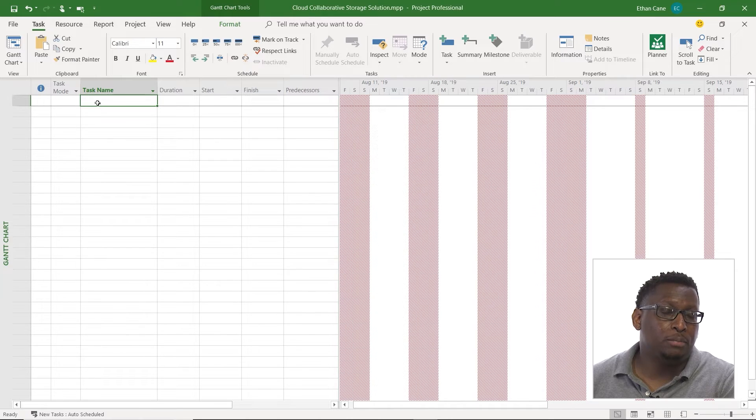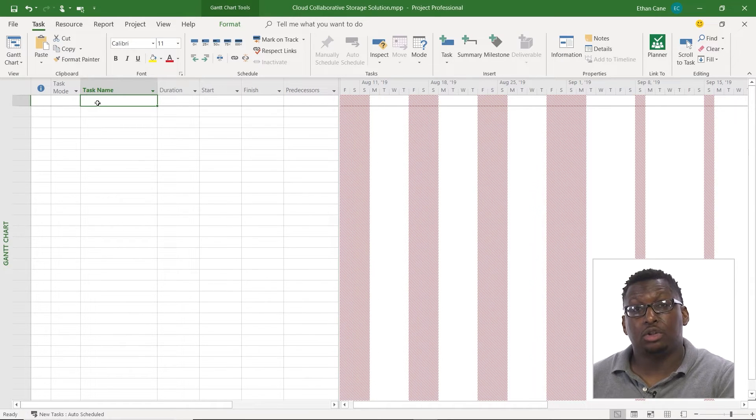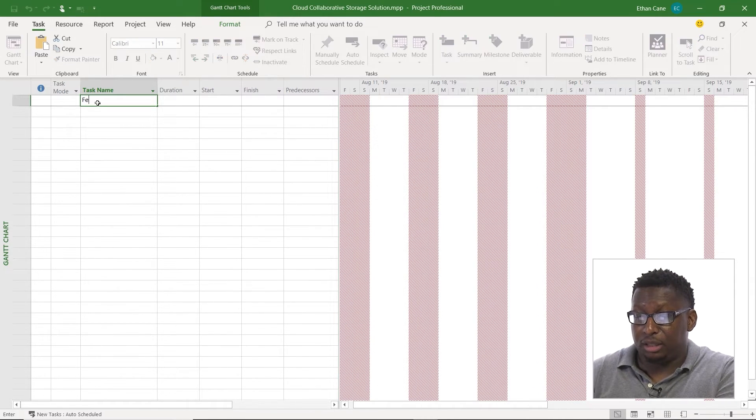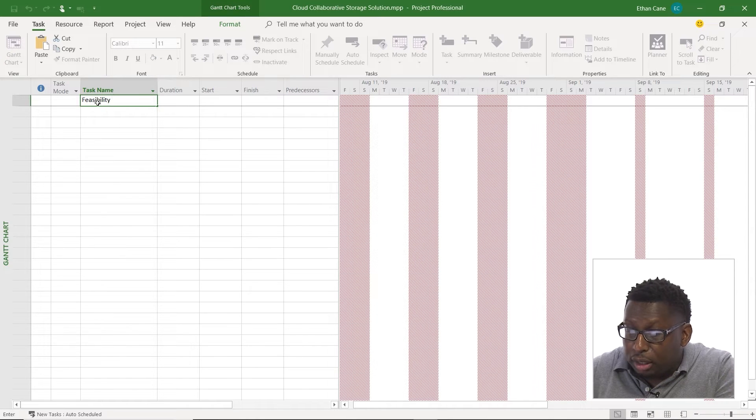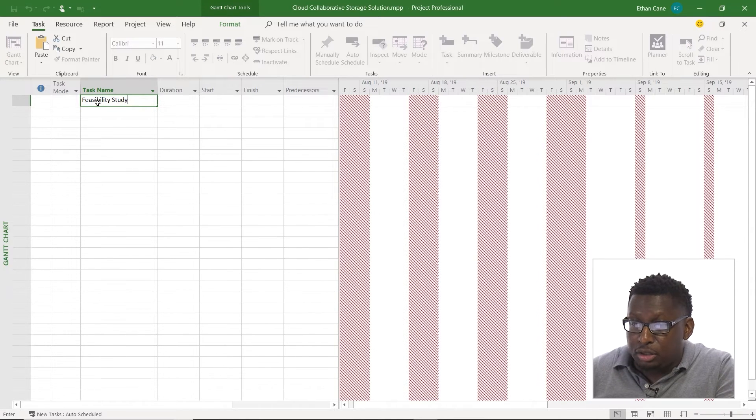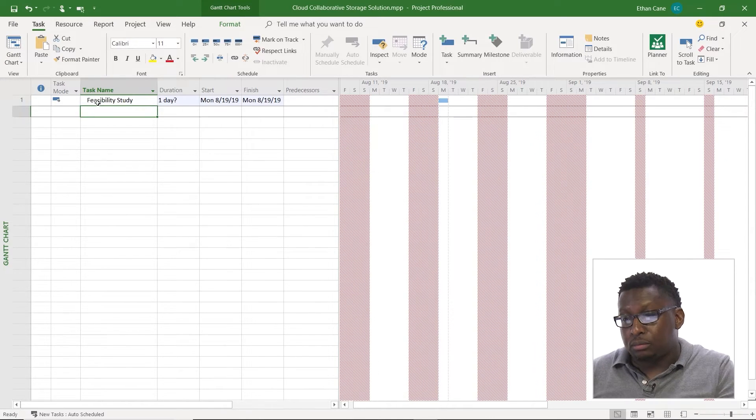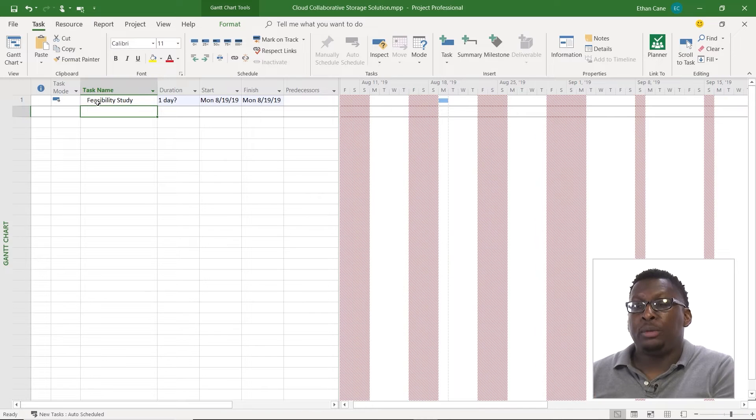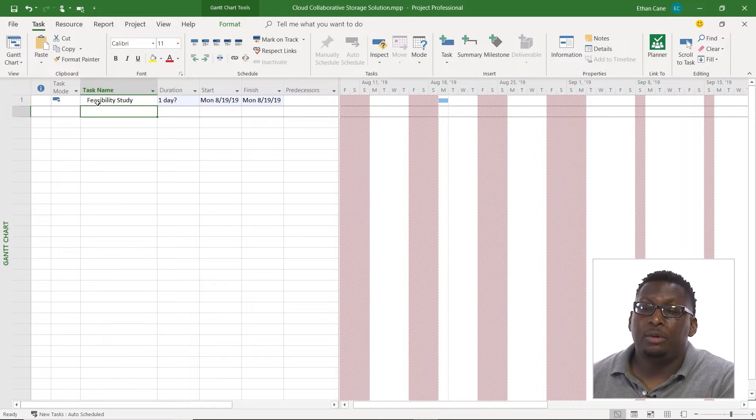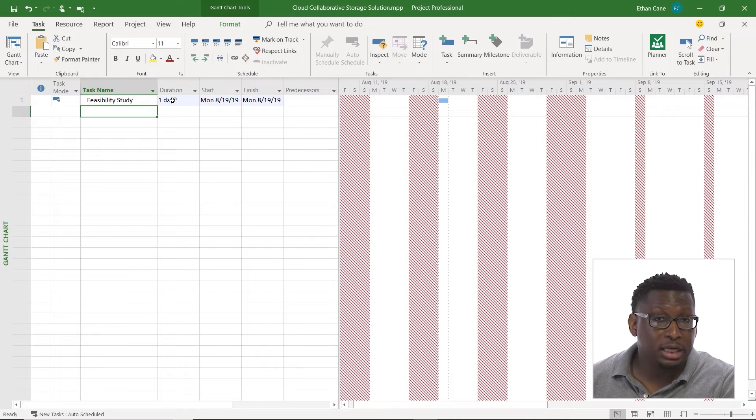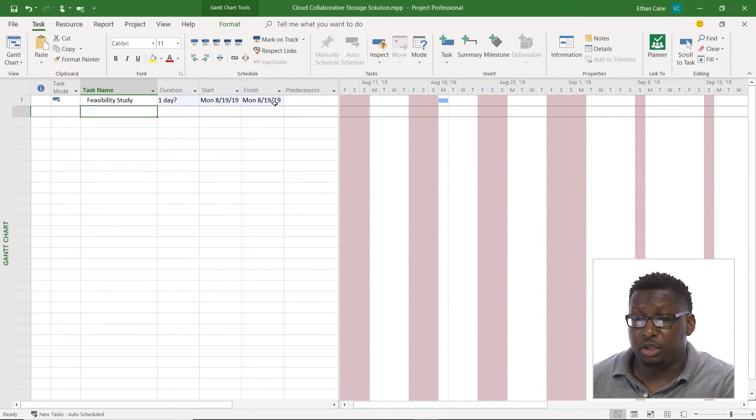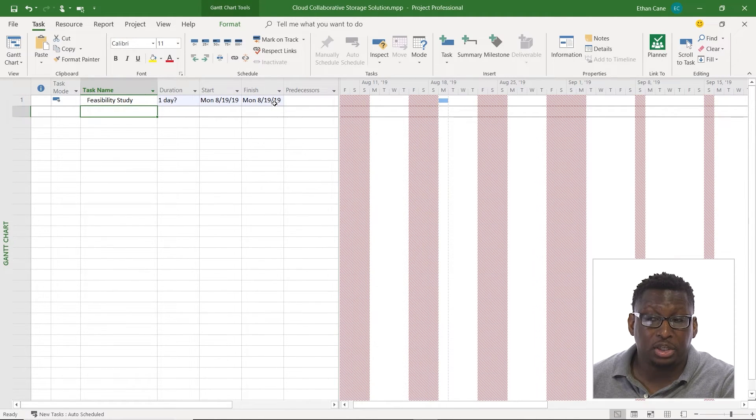So the first task that's going to be a part of our cloud storage solution creation here is a feasibility study. So let's spell feasibility correctly, enter, boom, there we go. Now we have auto scheduling turned on here so it automatically gives us our tentative one day duration and it gives us our start and finish based on the start of the project.